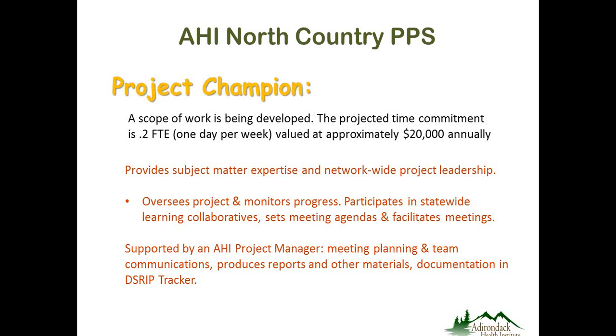Overall, the project champion would be overseeing the project, monitoring progress. They would participate in any statewide learning collaboratives or forums about that specific project, and would work with the project manager to set meeting agendas and facilitate the meetings. The project champion would be supported by the AHI project manager. The project manager at AHI would be handling the meeting planning, the team communications. They'd be able to produce the reports out of the DSRIP tracker, provide any other materials the group might need. We'll be handling the documentation for the quarterly reporting and so on. So lots of project management support.